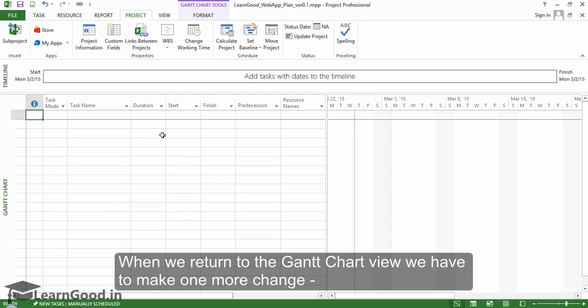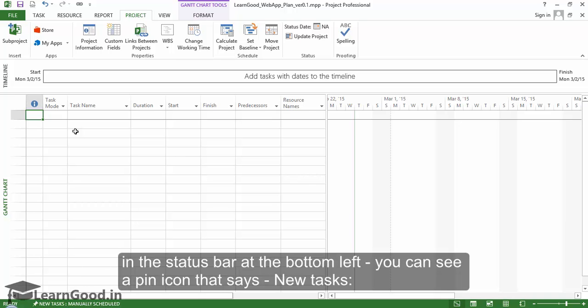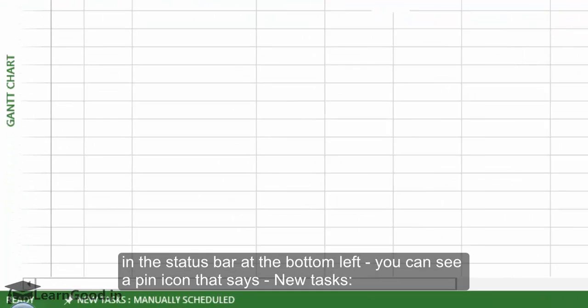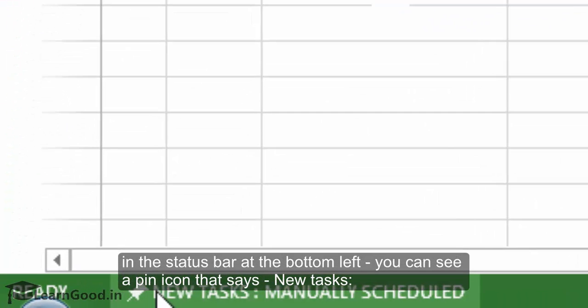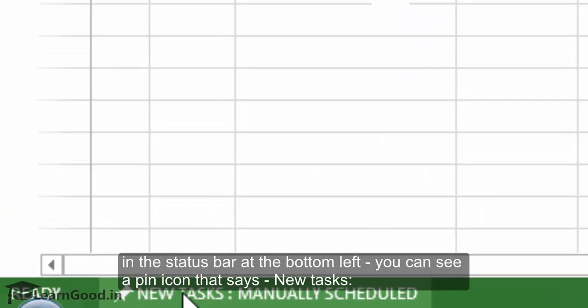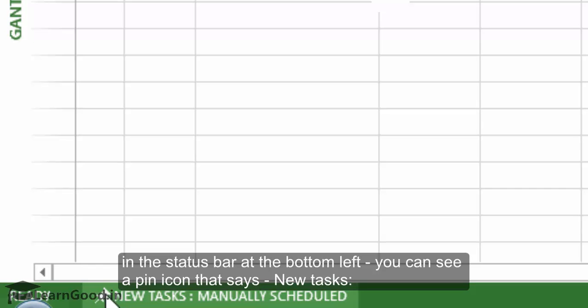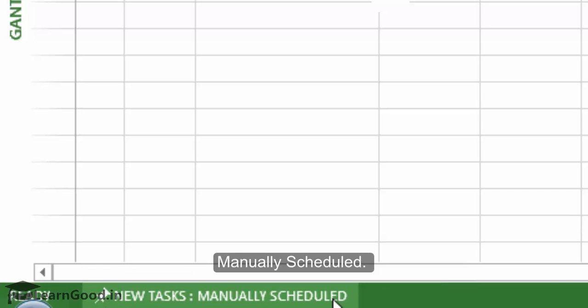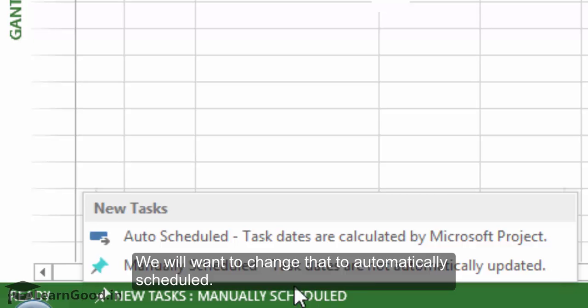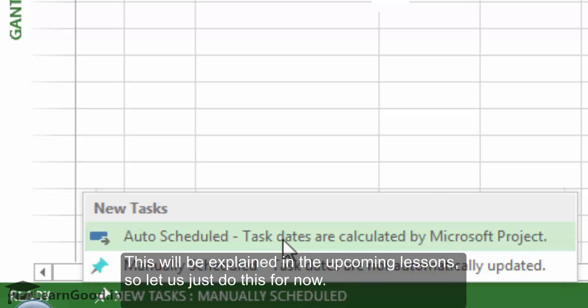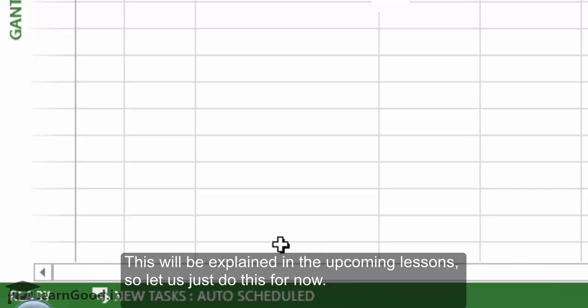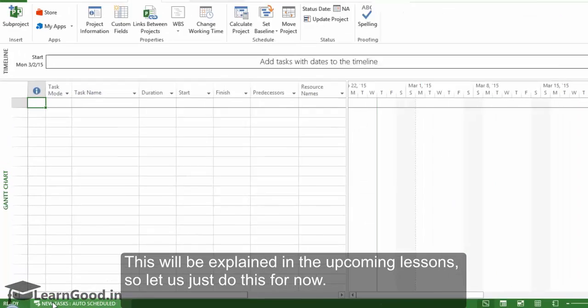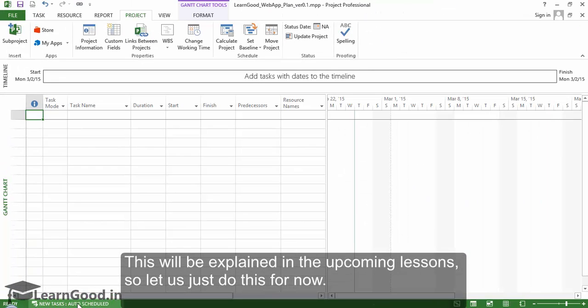When we return to the Gantt Chart view, we have to make one more change. In the status bar at the bottom left, you can see a pin icon that says 'New tasks manually scheduled.' We'll want to change that to 'Automatically scheduled.' This will be explained in upcoming lessons, so let's just do this for now.